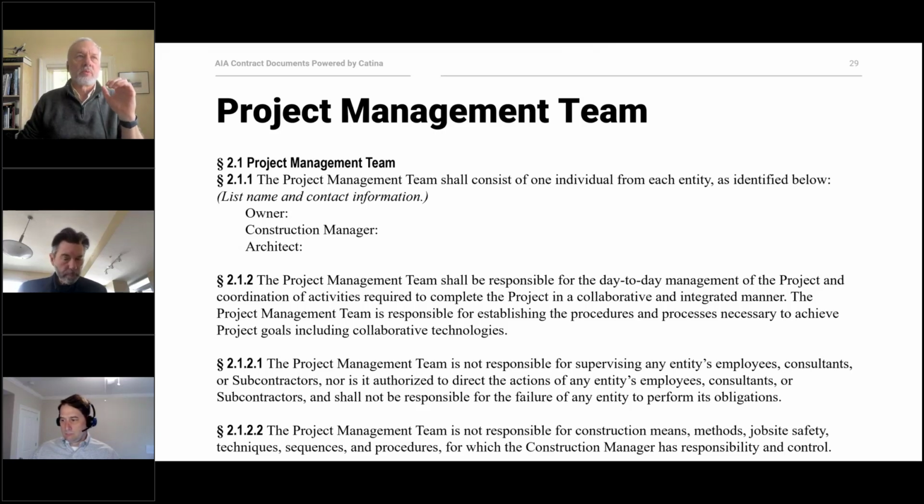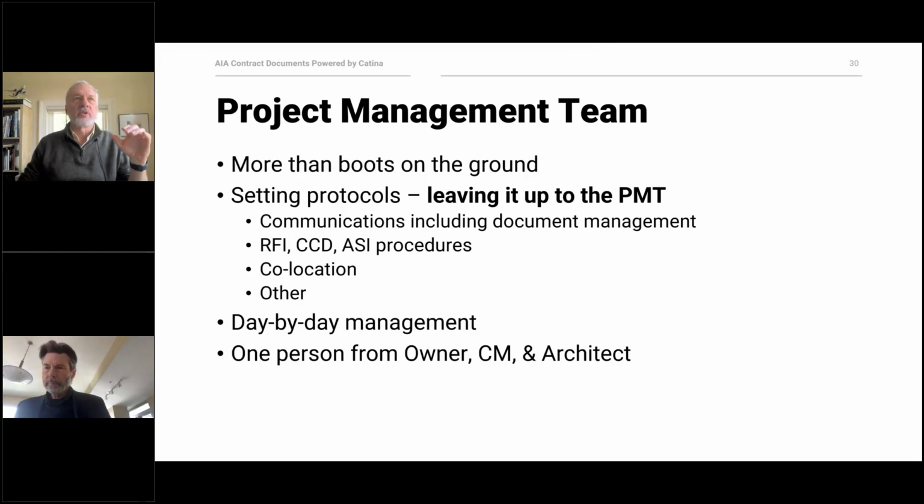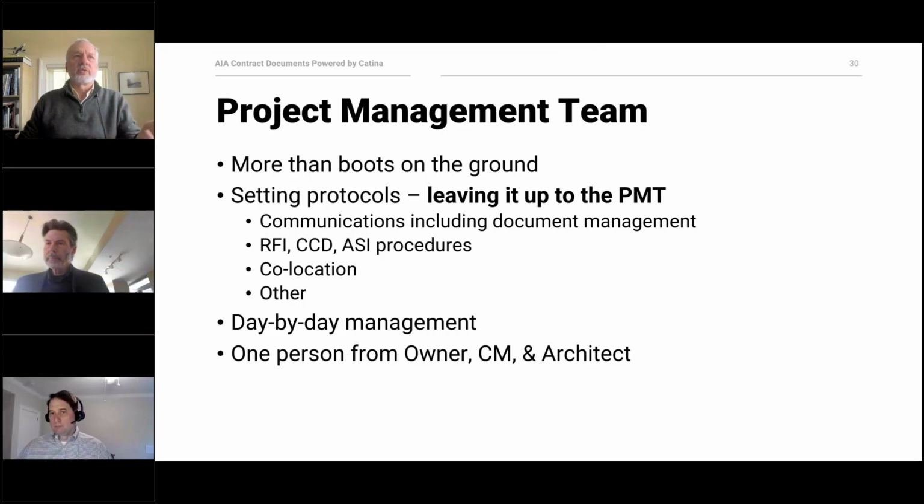There are a couple of points in here that we wanted to make really clear. So 2.1.2.1 and 2.2 want to make sure that this group is not the contractor. Even though it represents the contractors on there, we're not responsible for means and methods, and we're not supervising the other entities' people. So we're really wanting to make that clear. The PMT, project management team, is more than boots on the ground. They're setting protocols, the processes for your RFIs and your ASIs.